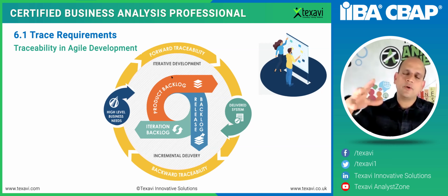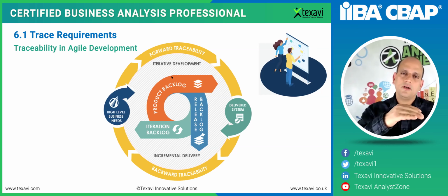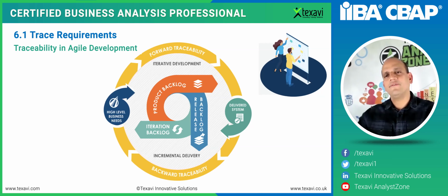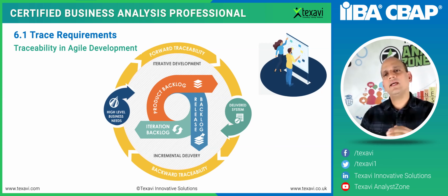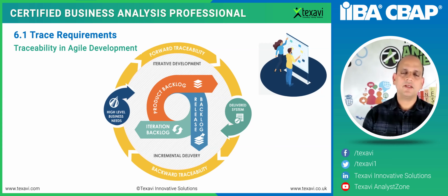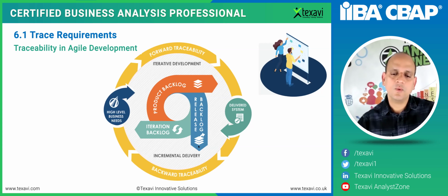So the product is actually growing. Initially, it has just 10 features. The next sprint, 30 features. The next sprint after, 50, and another sprint after. So after about 7 or 8 sprints, you're completing 100 features or 100 backlog items that you set out for the release, and you can go for the major release into the market as a big bang, right? So that's how you can try and achieve this.